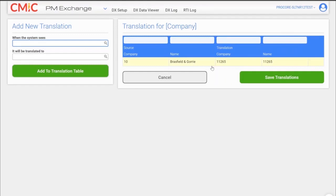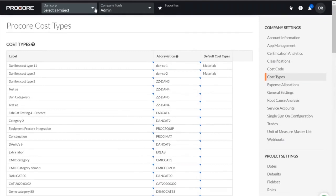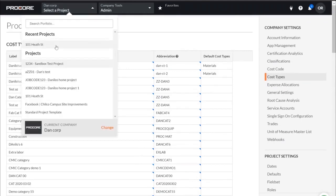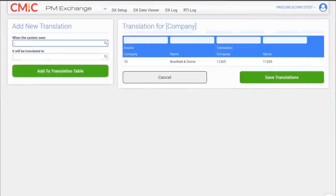As an example, I'm going to bring up the company code. The company code that this project is linked under in Procore is 20159; the company that this project sits in within CMIC is company 10. You can clearly see that the translation is in place — when the company code comes in from Procore and you need to create a commitment in CMIC, we automatically change it to company 10, so the data for the target system is always correct. This is the power of PM Exchange.